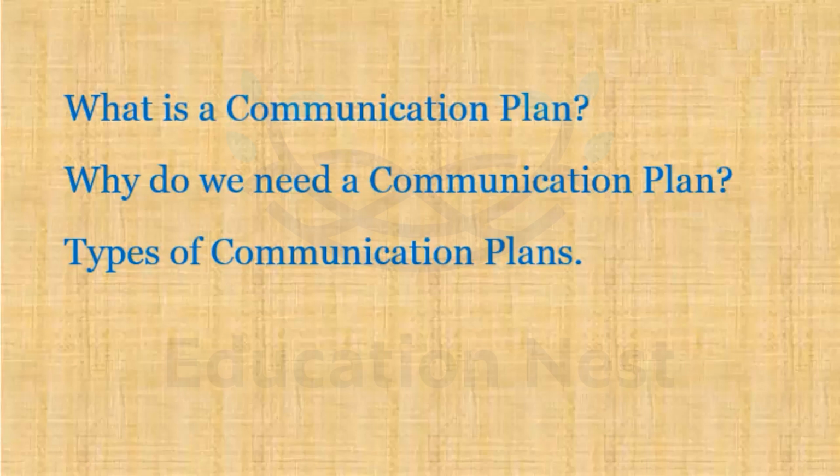The plan should also address who has the authority to communicate confidential or sensitive information and how information should be disseminated, for example, through email, websites, maybe printed reports and or presentations. Finally, the plan should define what communication channels stakeholders should use to provide feedback and how communication documentation will be archived as a part of the project records.